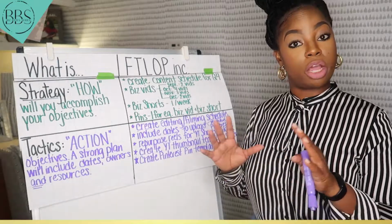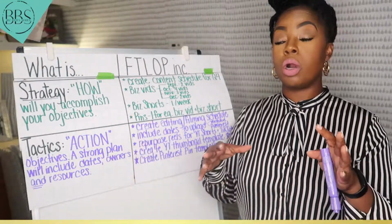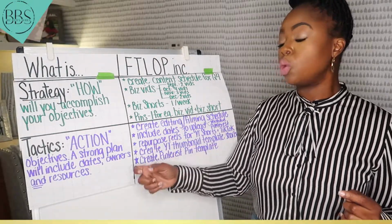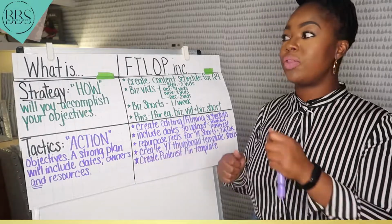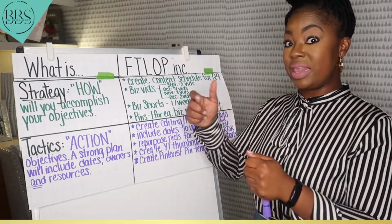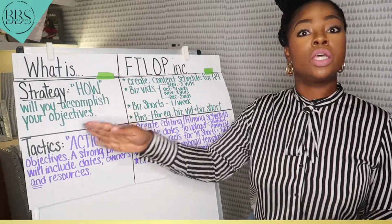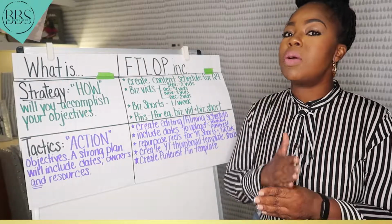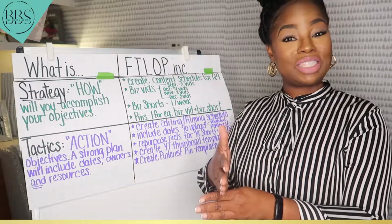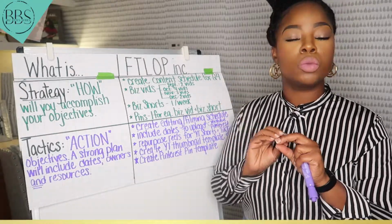may grab a snapshot from the edited content to apply to your thumbnail or screenshot. She may do multiple, or he may do multiple. So now that she's the owner, she's the one making sure, hey guys, did you get this for me? Because I need to get this done and that done in order for me to get my final piece done and meet the overall date. So you cannot only have resources, you also have to have an owner attached to it.